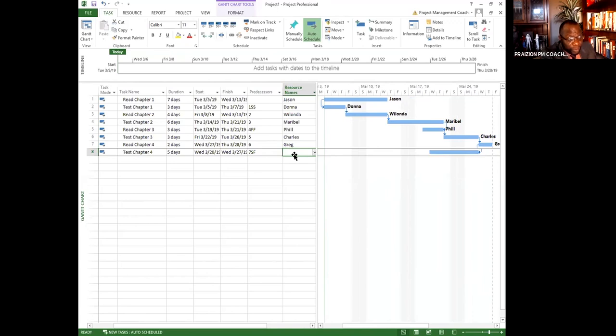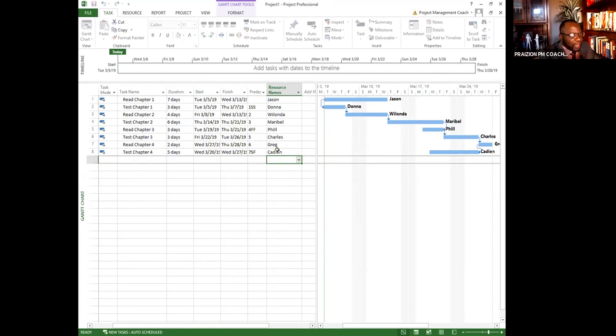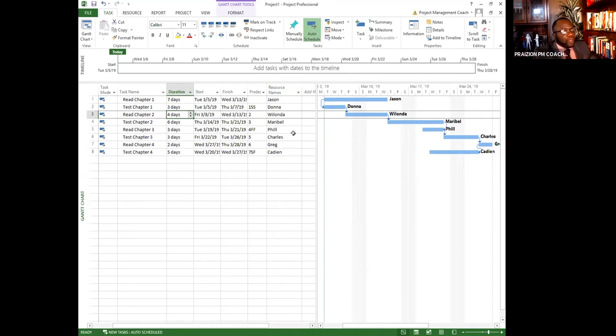There is an input from estimate activity resources. You need to remember that. That is a very important step. Okay. So the resource names, the resource assignments, happen outside of schedule, but you also need to factor that in to your grand scheme of who's working on this. And based on their proficiency, you know how long it's going to take. So if you've got a less experienced person, this, for example, might end up taking more, or this. All right, so that's your schedule.